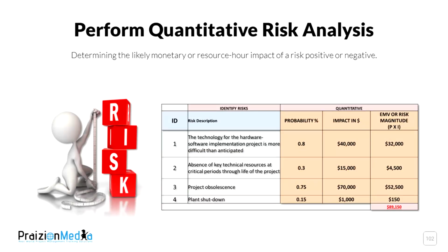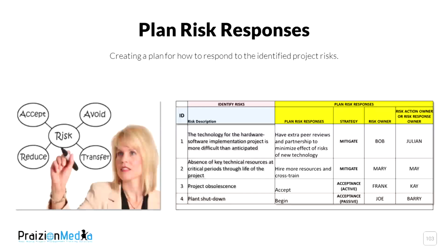In this process, perform quantitative risk analysis, we do not use the probability impact matrix. And I'm excluding this for those studying for the exam because oftentimes people think the P times I matrix is used here. No, it's not. As opposed to that, we use expected monetary value, which is talked about in the PMBOK guide. You also might want to look out for decision tree analysis and look out for that example in the PMBOK guide, 6th edition.